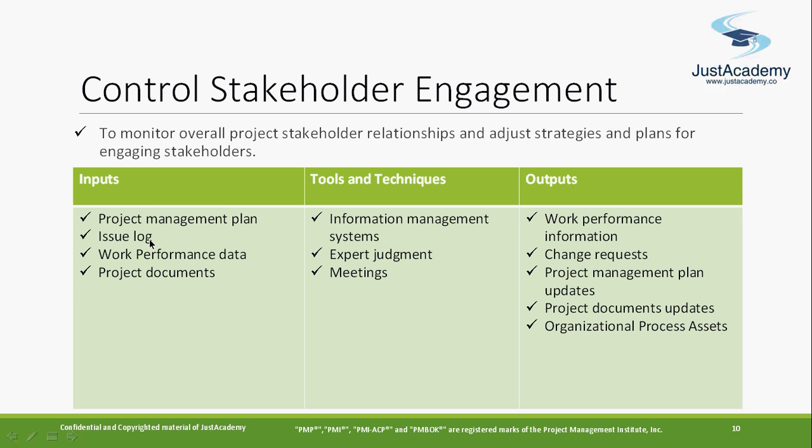The inputs will be the project management plan, issue log, work performance data, which covers how the stakeholders performed during engagement, how they are raising issues, and, if they are raising multiple issues, how much percentage you have resolved. So those will be your work performance data, and project documents.